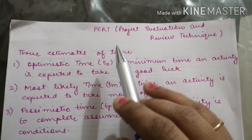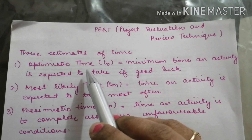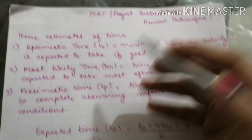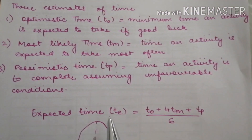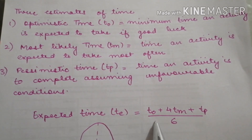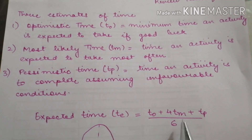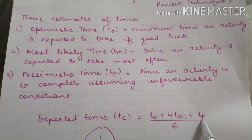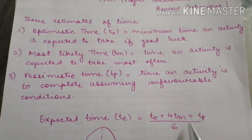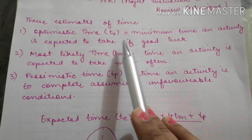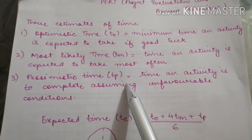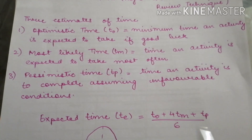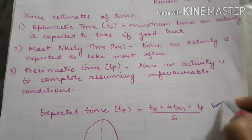Whenever we deal with PERT problems, we will have three types of time period: optimistic time, most likely time, and pessimistic time. The formula to calculate the expected time period is: optimistic time plus 4 into most likely time plus pessimistic time, divided by 6. When given these three time periods in a problem, you need to calculate the expected time using this formula. Always remember this formula.